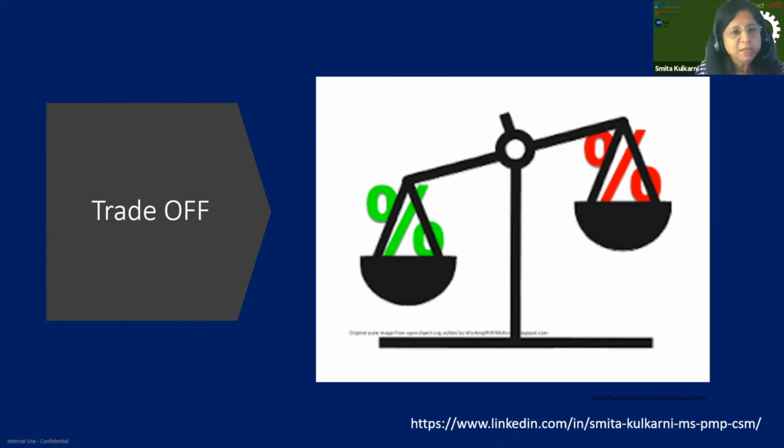So what I did was take that customer to our board and show him the whole product roadmap, and said, what you are saying is definitely right, but let me know if you want to swap these prioritized items so that we can move your high priority to the topmost level.